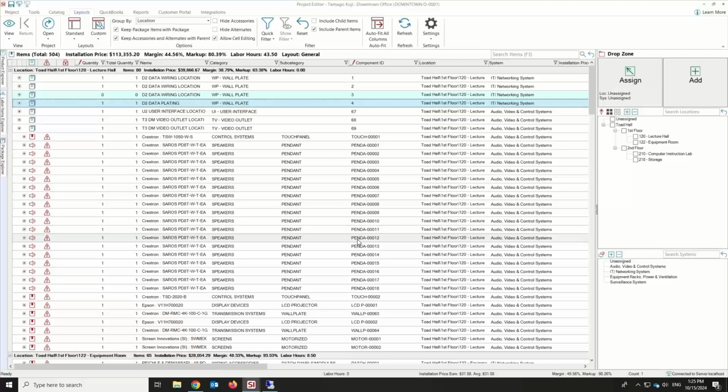And the major use case for these zero quantity items would be for you to build a project template that has the items in it, but there's no dollar value associated at that point, essentially, because there's zero quantity. And then your salespeople that you've trained so well can go in there and change the quantities as needed for what they need for that particular project.